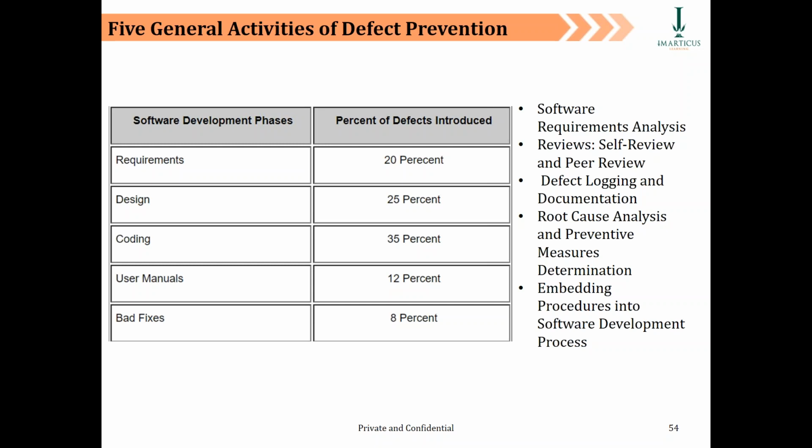Now, as we look at these things, you might like to ask me whether we have a mitigation for the same. And yes, of course we have. So let's take up coding, for example. We have some minimum coding standards to adhere to while we do the actual programming in the software development lifecycle. Your programmers in your team are likely going to be very, very familiar with those coding standards, number one. Second, after writing the code, they will run a sanity check on the code, which will bring out any kind of deviation which the code may have.